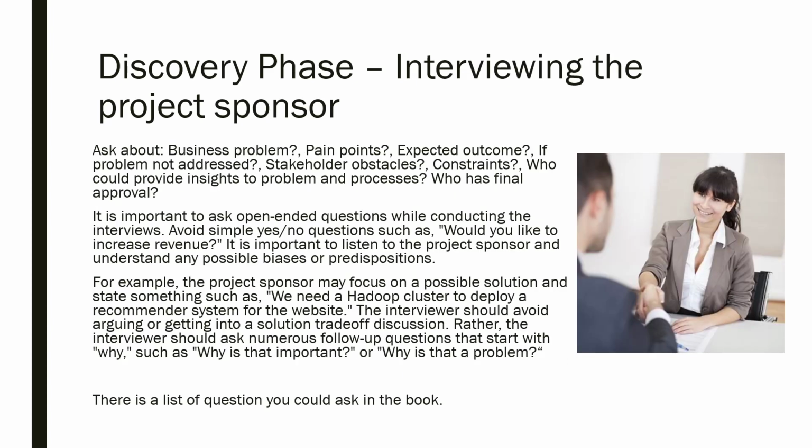We've got the interviewing of the project sponsors, as we've said. Here's just a list of some of the questions you could have asked. You could ask them, such as, what's the business problem, what are the pain points, what are your expected outcomes, what are your constraints. It's important at this stage to try and ask open-ended questions. So ask questions that they can discuss in their own way. Such as, what's your expected outcome is really good because that's an open question.